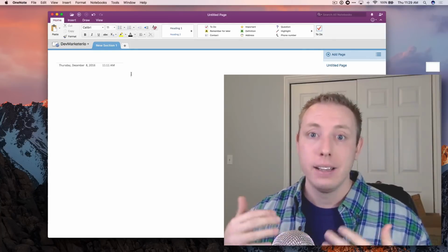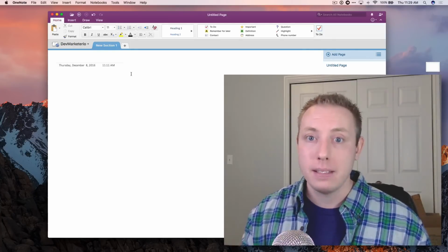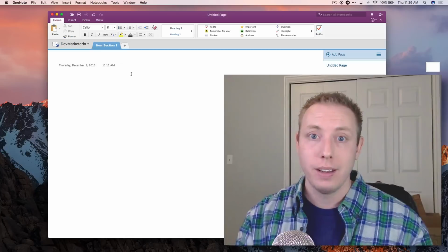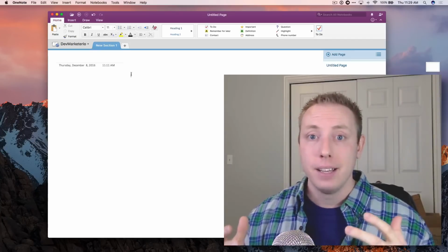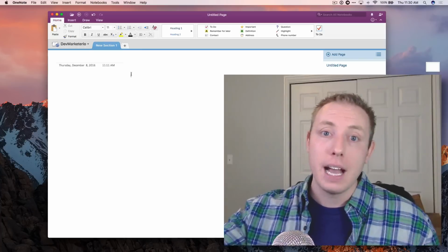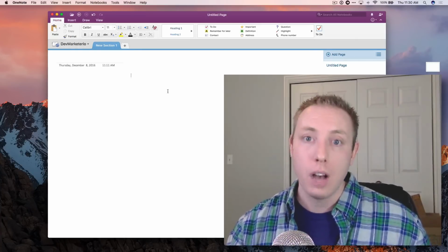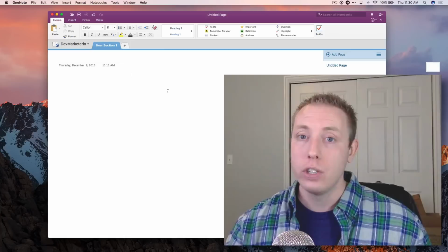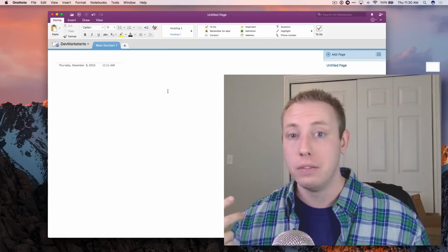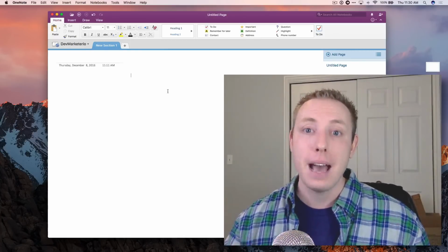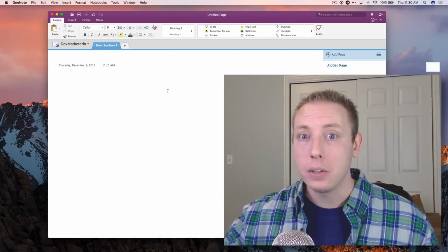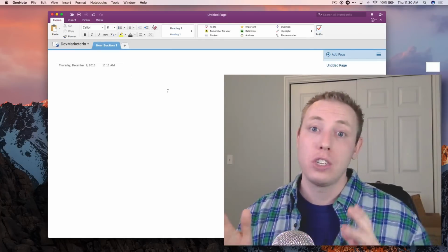And the most important thing that I recommend, what we're going to start in the next video, is what I call the idea dump. Okay, the idea dump basically means you go in with everyone in a room, or virtual in a remote setting, and you get everyone together and you just say, hey, what do you guys want to do? And you dump every idea onto a whiteboard, onto a document, which is what we're going to do here. And you just write every idea down, whether it's a good idea, whether it's a stupid idea, whether it conflicts with another idea, doesn't matter. You write everything down.